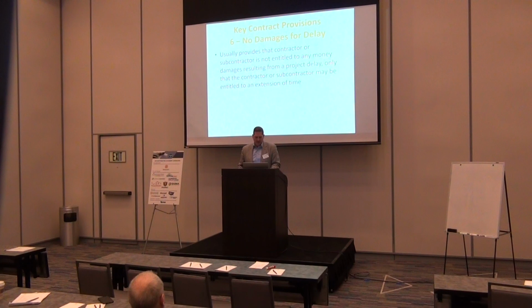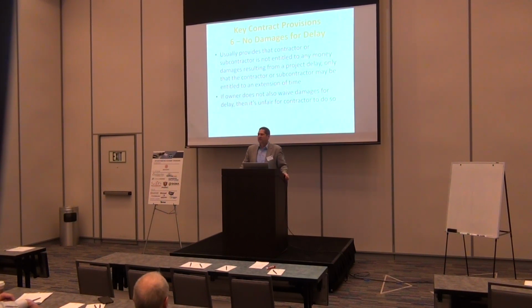So that's something I would look at the time that you're bidding a project and certainly at the time that you're contracting. And what I would say too is that if the owner is not willing to waive their damages for your delay, liquidated damages, then it would be unfair for the contractor. So that might be an argument that you could use with an owner when you're trying to negotiate that piece: let's try to do something that's fair to both sides. If you want damages if I don't finish on time, then maybe I get a bonus if I get done early, or maybe I get damages if you delay me.